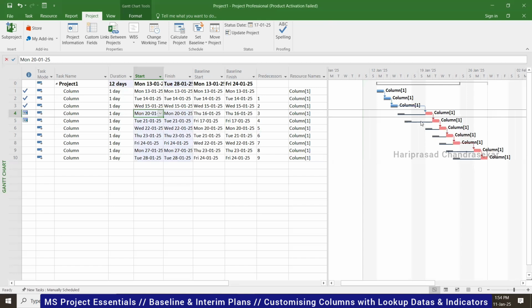So, got the concept now. The tool here is simple, so either we can do it manually. The baseline start and baseline finish you should not change; whatever we have, we can compare with these columns. See, it was supposed to start on 16 but it is 20, so for comparison in reports and all, you can have these columns. Otherwise, you can hide it.